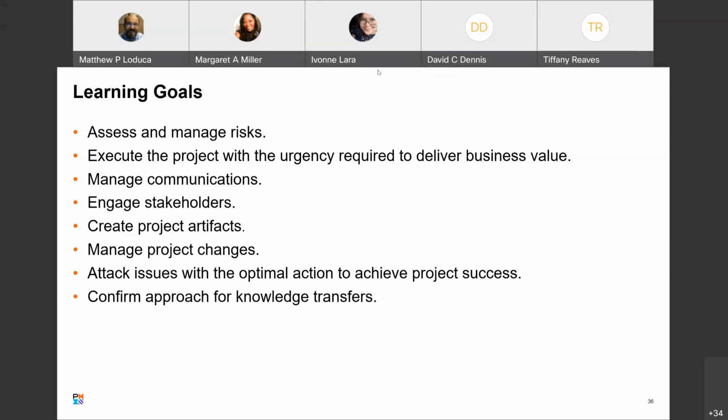You're going to give them that house with a bathroom and a kitchen and plumbing and electrical and heating and cooling and a roof over their head and then locks on the doors and windows, but everything else is not going to be there. That's the whole minimal viable product, and that's an Agile thing. Delivering something that they get value out of. I can get out of my apartment, I can move in here, I can live, I don't have to pay for all these other things, but I got something right out of the gate. So that's the concept behind it, in a nutshell, and it's central to Agile. Time boxing is central to Agile too, but I would say minimal viable product is one of the big keys. Okay, thank you.